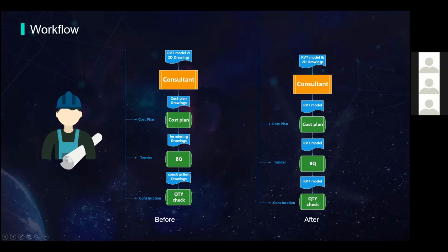These drawings always come from the model itself, and then you can proceed with QB cost for different quantities. So cost plan, tendering, construction stages: three different stages where you are preparing quantities using QB cost side by side. What's important to notice are the reductions, the overlapping, and the rules of measurement. These are the main differences between the quantities of Revit and QB cost.